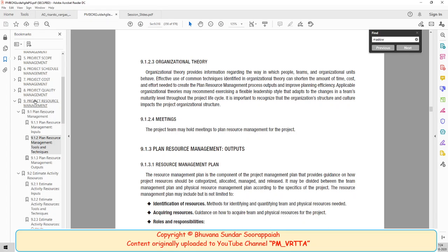Based on the limited information from your customer, you give a high level estimation. This is what you call ballpark. The first estimation that you do in any project is a ballpark estimation, and the range changes. Usually it's understood to be minus 5 percent to plus 20 percent.